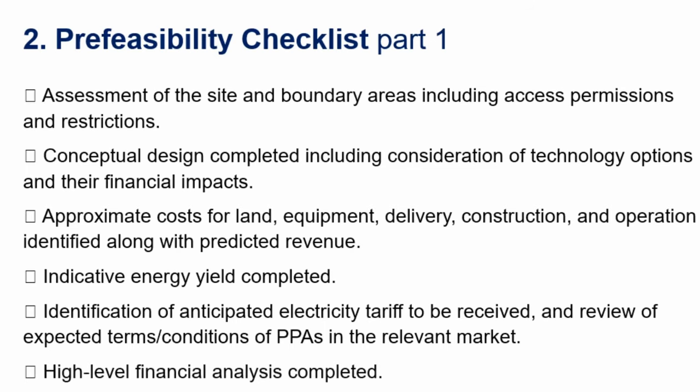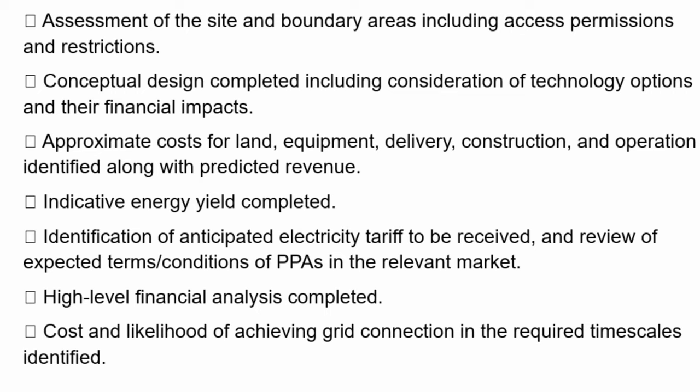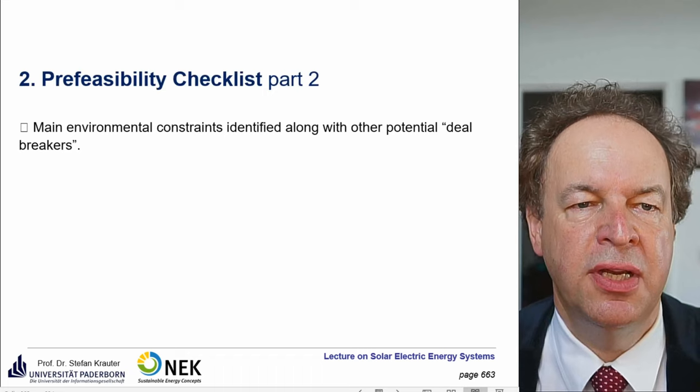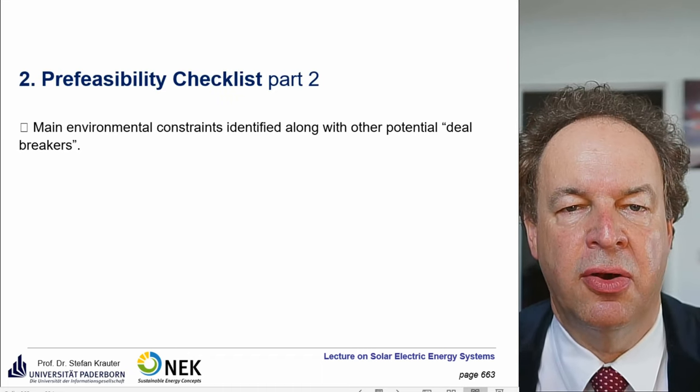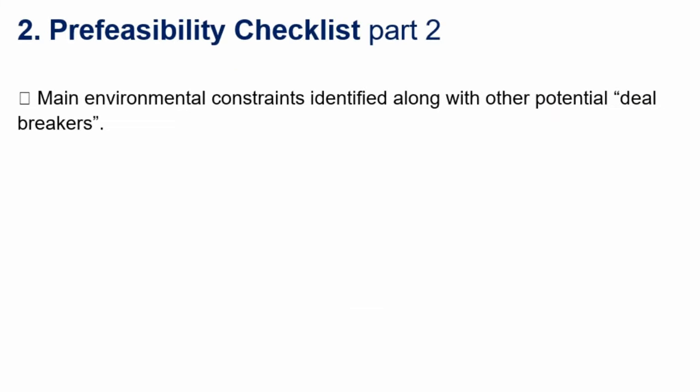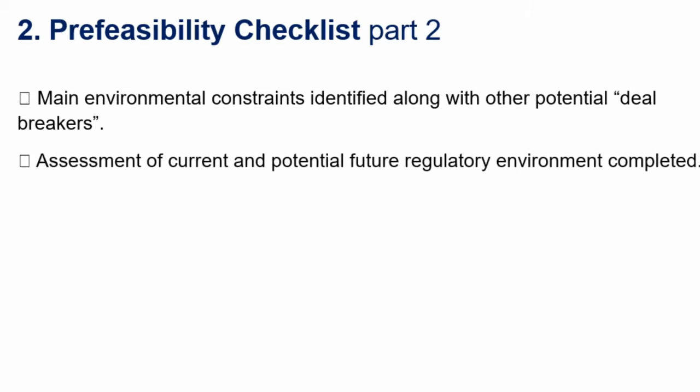Then you carry out a high-level financial analysis, and assess the cost and likelihood of achieving grid connection in the required timescales — this depends on experience with the utility. The main environmental constraints are identified along with potential deal-breakers — there could be a change of government, a change of utility ownership. Assessment of the current and potential future regulatory environment is completed — you have to make a future estimation of what will happen, because when you finish your project, the contract should still be valid.